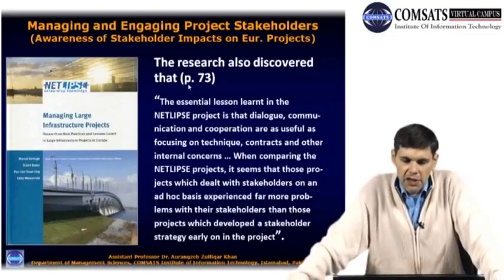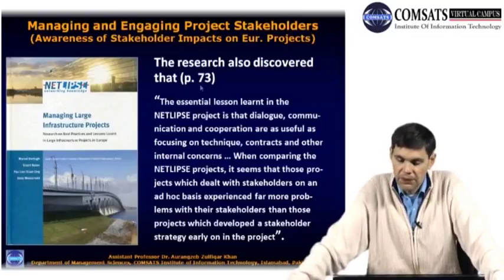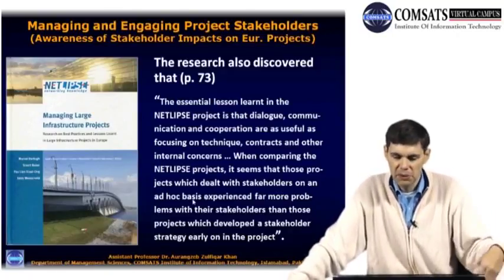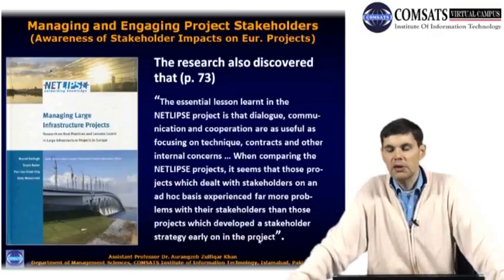Also, on page 73 of this book, the essential lesson learned in the NetLibs project is that dialogue, communication, and cooperation are as useful as focusing on technique, contracts, and other internal concerns. When comparing the NetLibs projects, it seems that those projects which dealt with stakeholders on an ad hoc basis, that is, come and go basis, whenever they see fit, experienced far more problems with their stakeholders than those projects which developed a stakeholder strategy early on in the project.